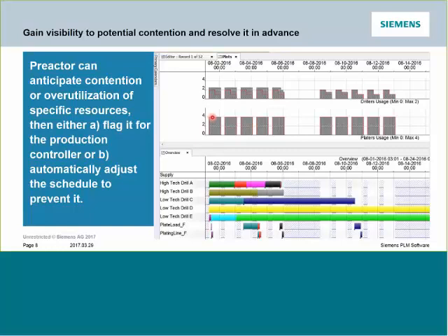There's a total of 4 on staff whenever the shop is open. And we can see that the gray, the number of platers at work, is always within the red line, the number of platers available. Now, if we look at drillers, we see a different story. We're actually okay by the time we get out into the future. Here we can see we've got a varying number of drillers.